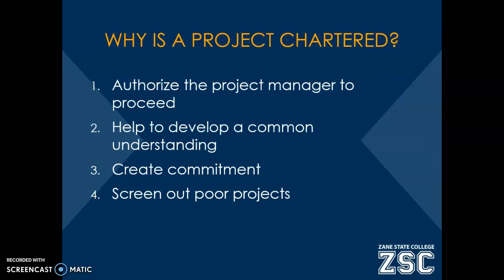So why do we need to go through the formal process of developing a charter? Can't we all just sort of have a handshake and agree to get started? Well, there are several reasons why you might want to have a formal charter. One is it provides written authorization for the project manager to begin working. So the sponsor of the project is essentially agreeing to support the project manager. It helps develop a common understanding so everyone is on the same page. Everybody knows what the expectations are, and there's no miscommunication.